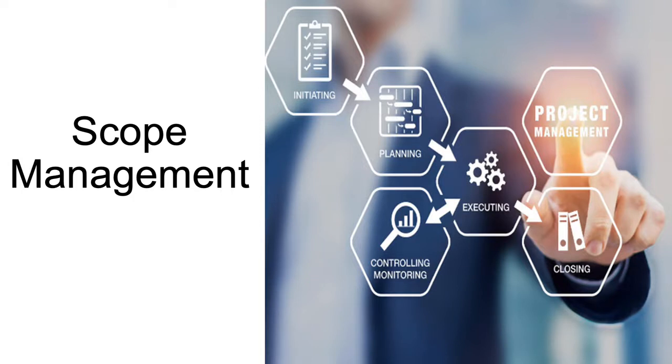In project management, guys, absolutely everything is connected. It means that any change to scope must be evaluated for its effect on other constraints, such as resources, such as time, such as costs, quality, risks, and so on. We need to calculate how this change to scope will further impact all these areas. And this is what scope management is all about.